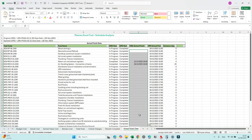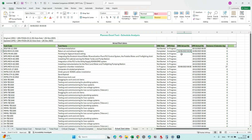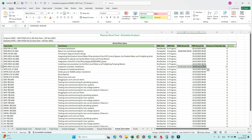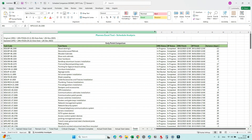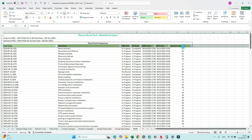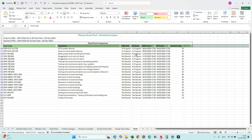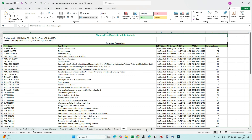Actual Start: again we have similar situations — activities that had an actual start date of 4th June now show 10th June, and another moved from 3rd August to 30th August. We need justification for why actual start dates changed. For Early Finish, many changes may appear, but the variance should not exceed 30 days. Any shift of more than 30 days within a 30-day update period needs to be understood — same applies to early start.